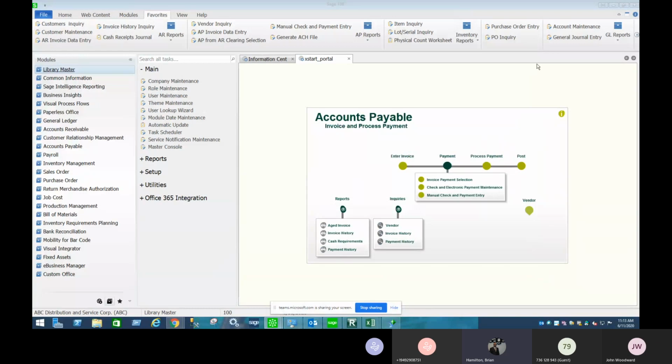No, you'll run Sage 50 and 100 in tandem, while your 100 project's going on. And then the day you go live in 100, you're going to stop doing your transactions in Sage 50. And so there'll be a data migration of data over once the program's installed. And so all the training that you and your users are going to do will be in your data. And that's kind of nice because you'll be familiar with certain things because it's your data. And then the night before you go live, there'll be one last data dump. And then the next day you'll flip the switch and go 100.